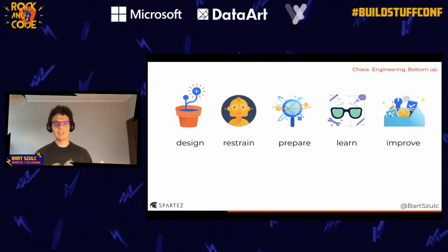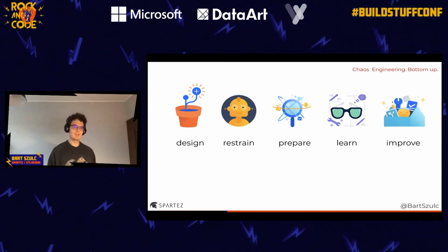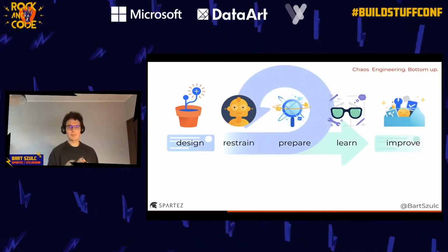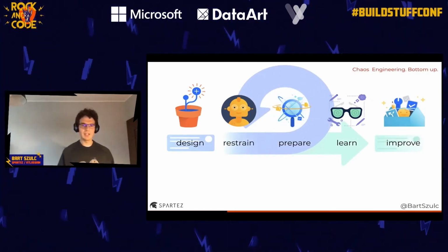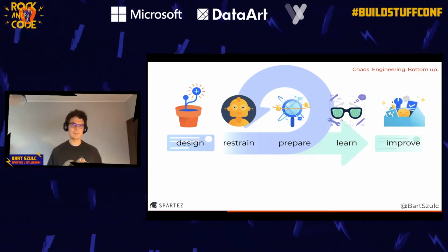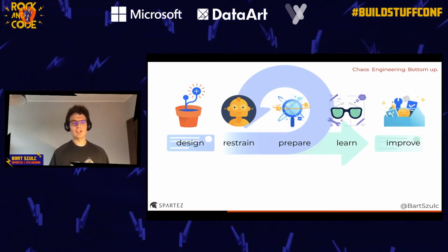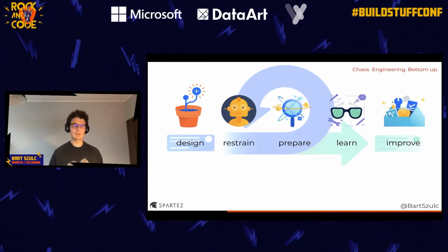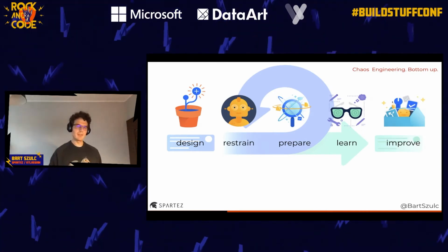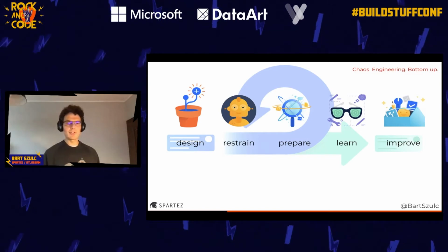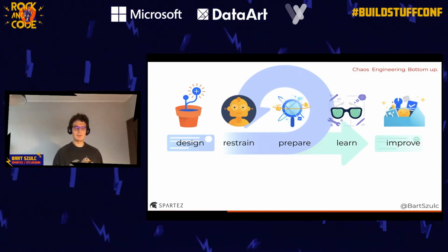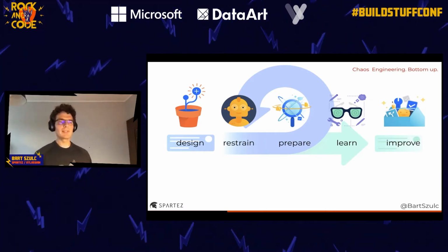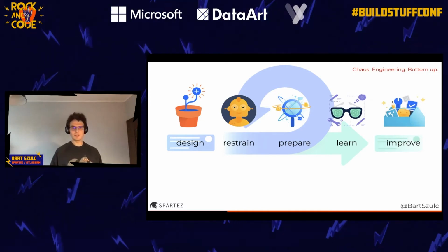So basically, all the exercises that we do that are related to chaos engineering are split into 5 phases. And the work related to those phases happens during the standard development process. So there is no special sprint every once in a while where we focus only on reliability work, only on chaos engineering. Every once in a while we decide to run a chaos engineering exercise in every sprint. We try to allocate some time for every single phase of the exercise. So what are the phases?